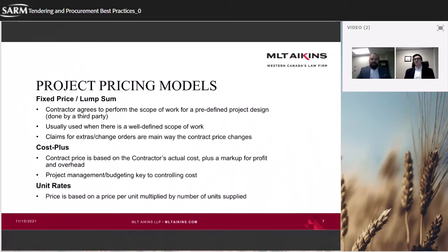So that in itself doesn't really align with fast track projects, where contractors can get going on a scope of work that is going to be done while the rest of the design development is underway. Frankly, the entirety of the project needs to be designed, and then you go out and get a price on that. The other thing it doesn't bode well for is renovation type work,